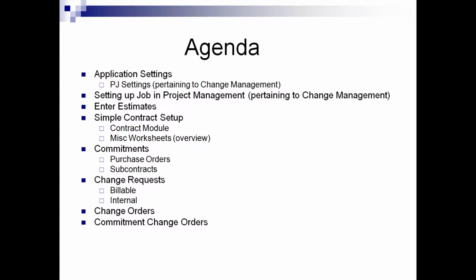After that, we're going to take a look at change requests for both an owner change, an estimate change, and a commitment change. And then we'll take a look at bringing those change requests into an actual change order or a commitment change order, or simply bypassing the change requests and going directly to a change order itself, which you have the capability of doing that.